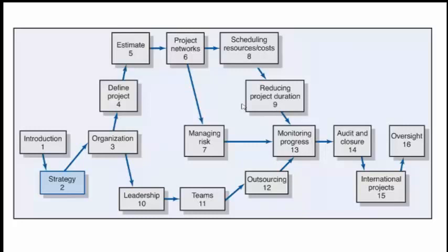Within the macro level, there's something called function point estimate, where you do data function point and transaction function point. Data function point talks about what you call data sets, data files, what are the input files, what are the output files you have. Based on the files, what are the field lengths, what is the total size of the file, based on which you classify them as simple, medium, complex.